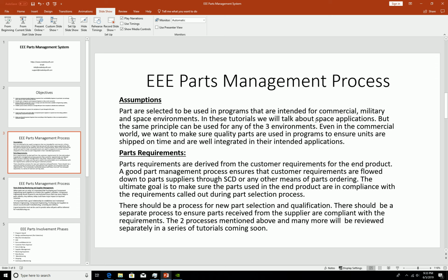By creating new parts, you introduce new issues: potential requalification, potential failure during qualification, getting a part from a supplier that you should not be doing business with, potentially having failure during manufacturing, potentially having failure during screening.